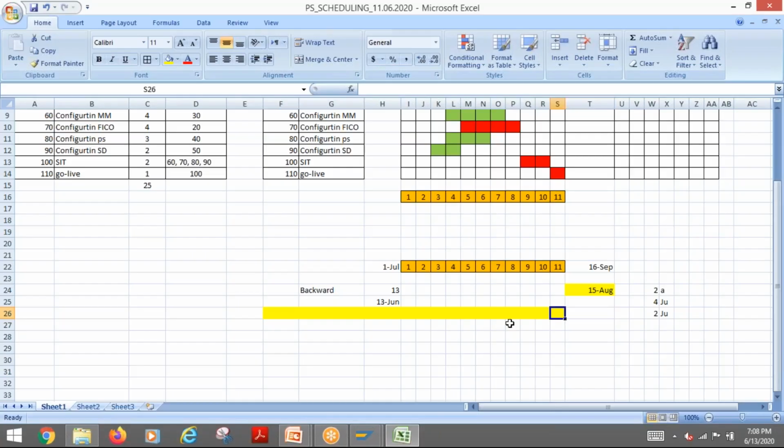So for example, if I put an unrealistic project finish date, what will the system do? If I use backward scheduling, the system will schedule it in the past. Now scheduling in the past is not a practical solution, right? You cannot work yesterday. You can work today and tomorrow only. So in a real case, this is not applicable. So we will put a condition in the configuration that no date in the past is allowed.